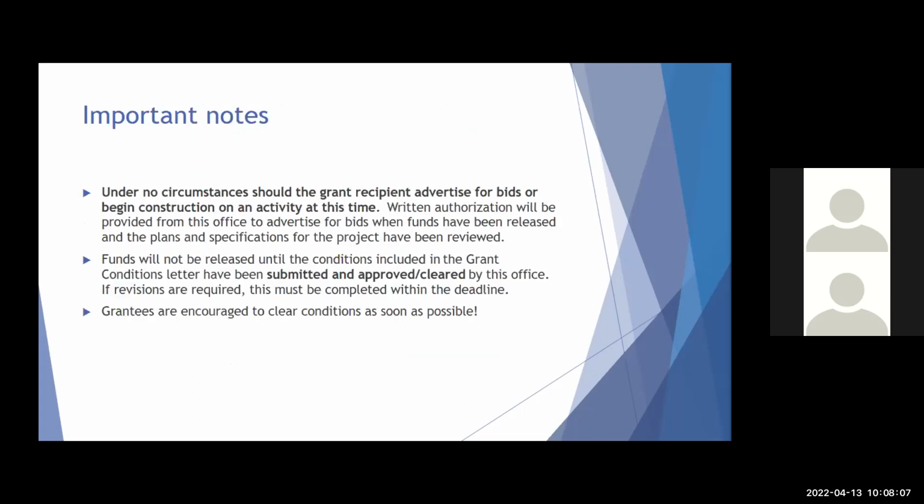Just a couple of things I wanted to point out to you all. I'm going to read this because I want to make sure that everyone hears this directly. Under no circumstances should the grant recipient advertise for bids or begin construction on an activity at this time. And I mean by that an activity that is funded with water sector program funds. Written authorization will be provided from this office to advertise for bids when funds have been released and the plans and specifications for the project have been reviewed. We will not release funds until all the grant conditions, including in the letter that you have received, have been submitted to our office and approved and or cleared by this office.